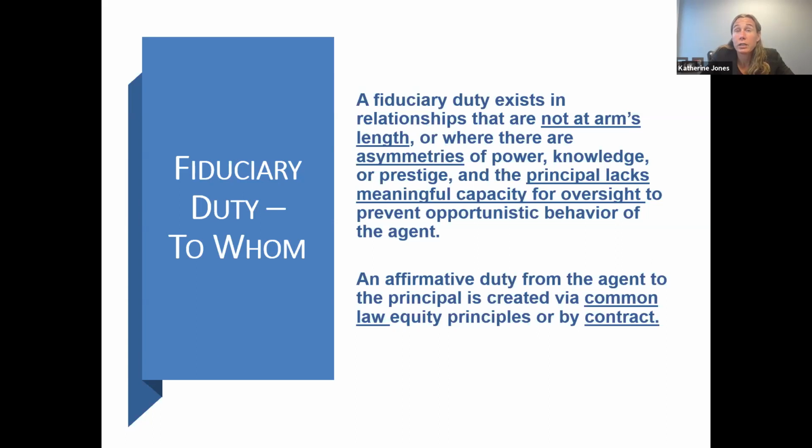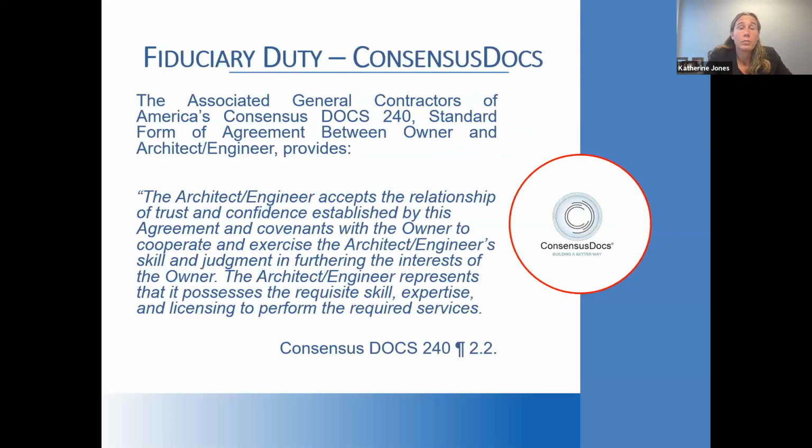This can also arise in an architectural or engineering setting. We're going to talk about that in a little bit, but let's start with consensus docs, because there's a lot of effort that's been put into form contracts, where both architects and engineers spend a lot of time trying to disavow any fiduciary duty. The reason is that they want a contractual arm's length relationship, and they don't want this higher fiduciary duty that can exist.